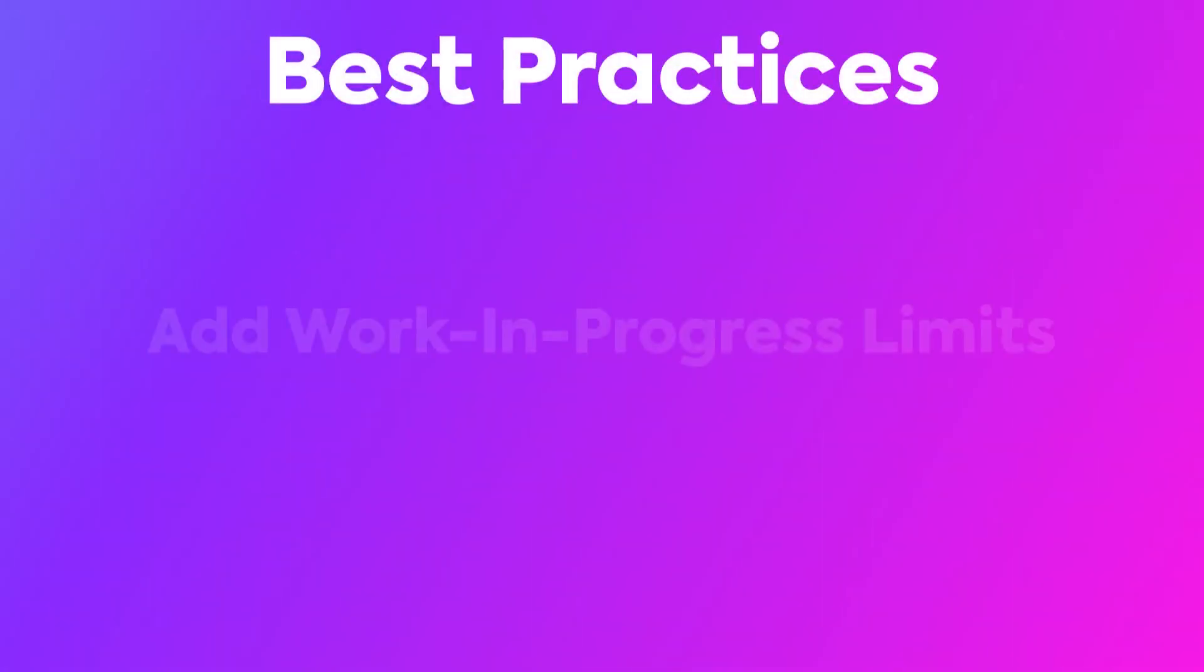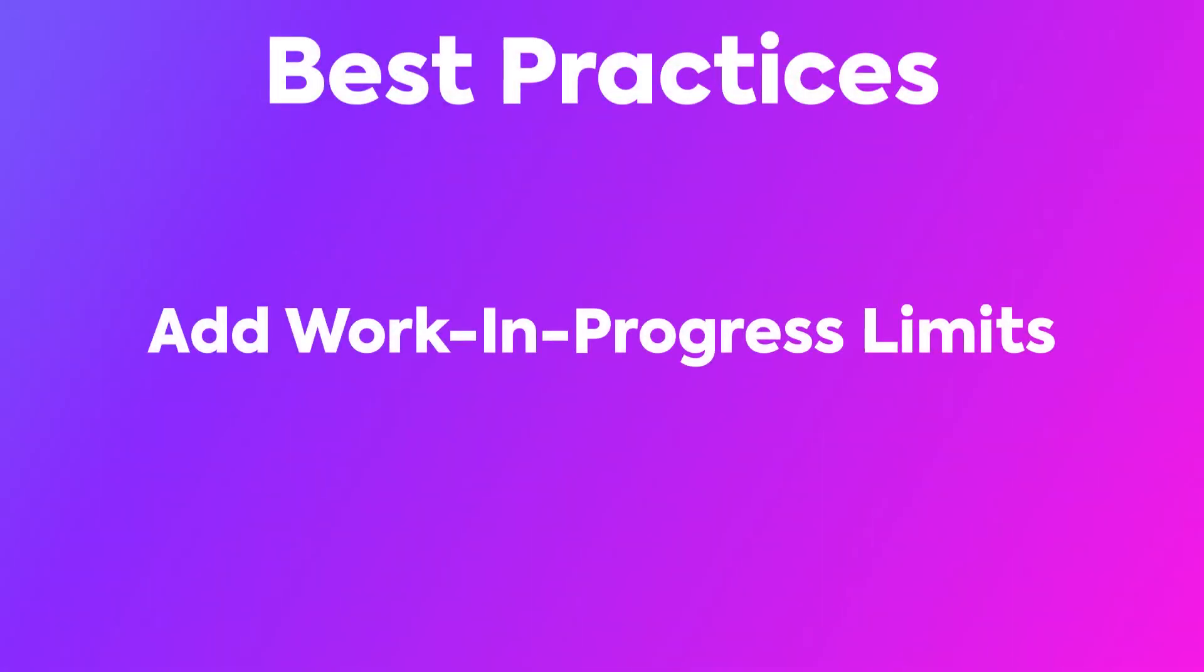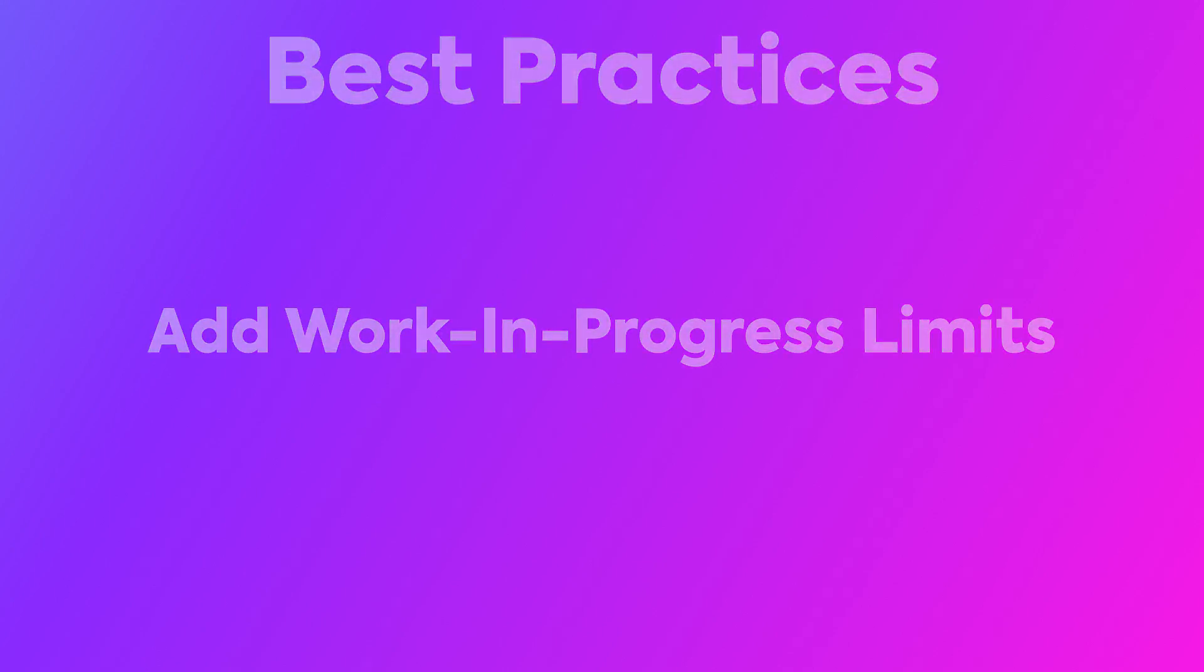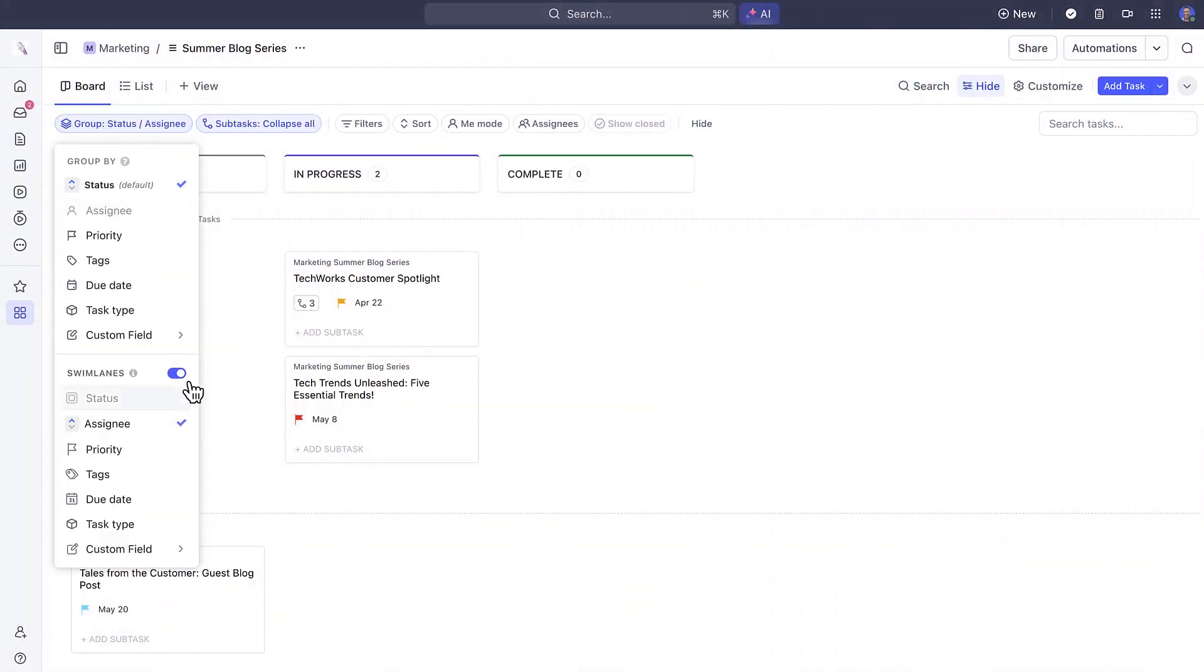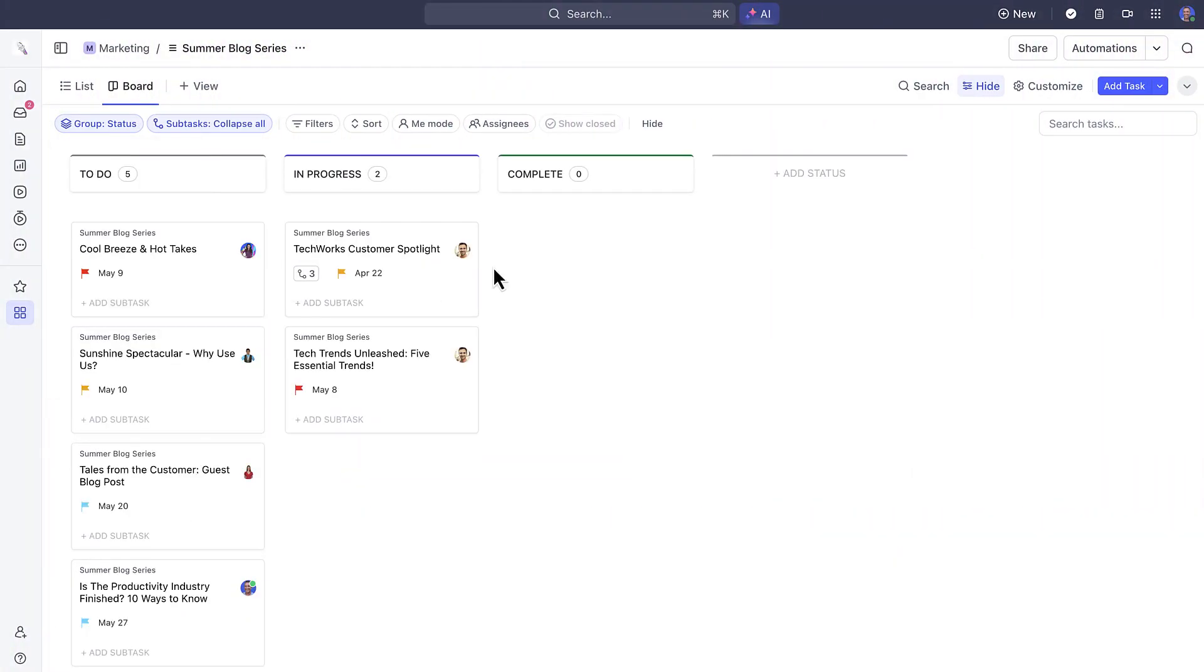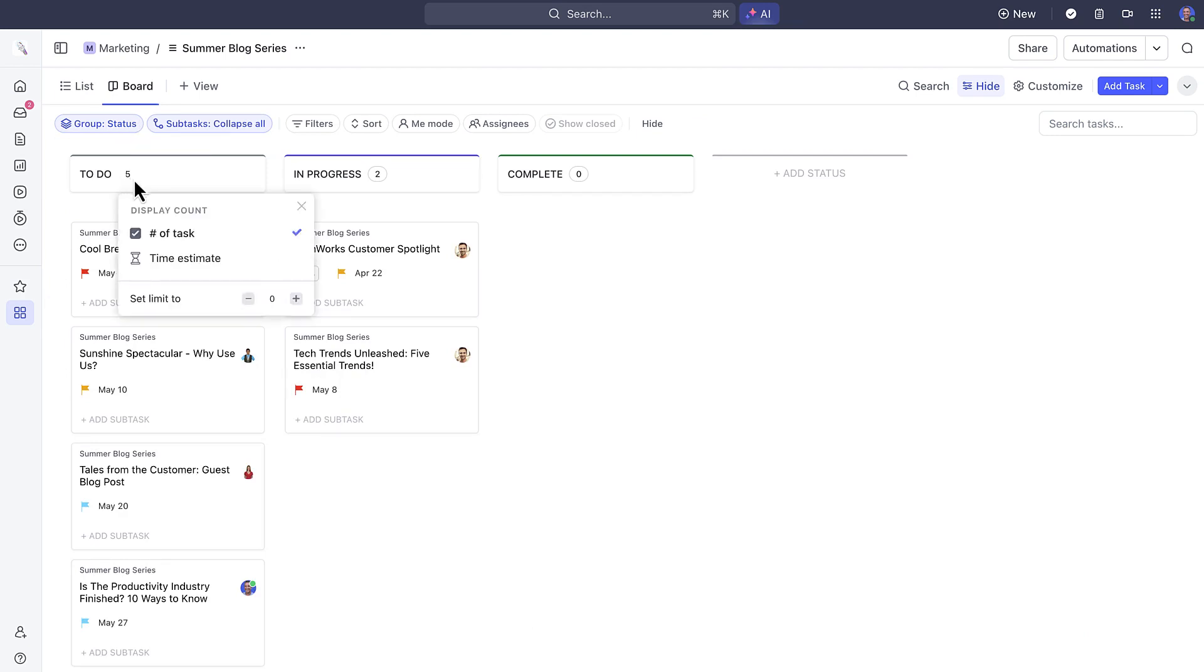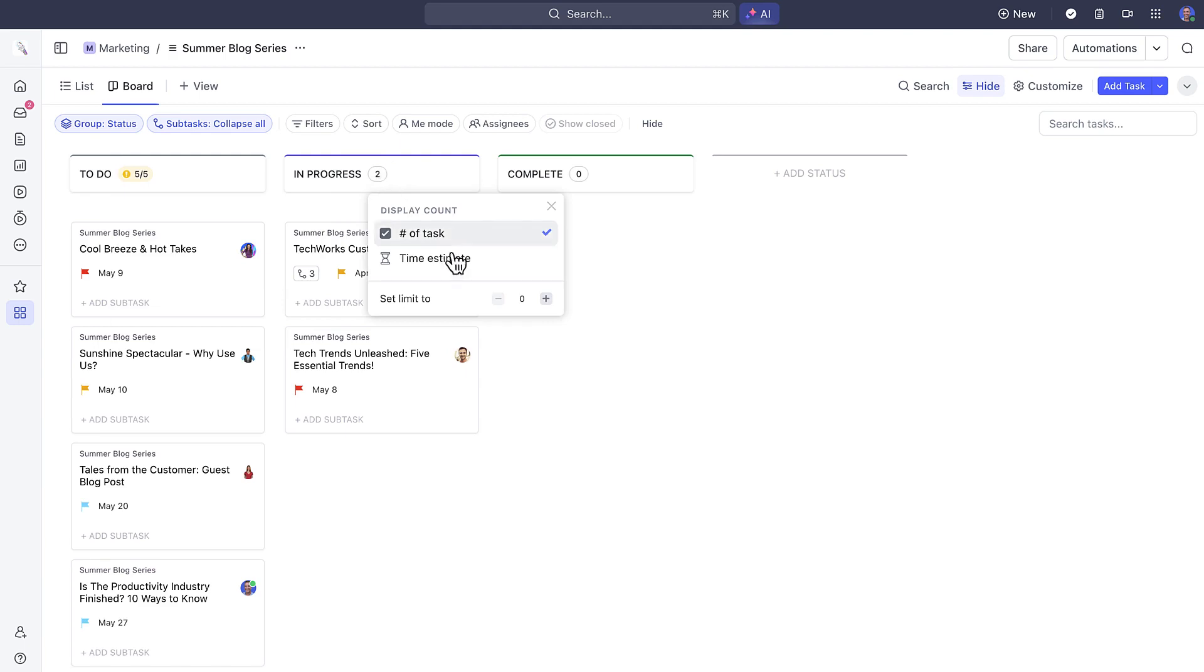The next best practice is to add work-in-progress limits to your Board View. If you're managing your tasks in an agile way and have some limits in mind for each task status, you can select the max load of tasks that you and your team can take on within each status.